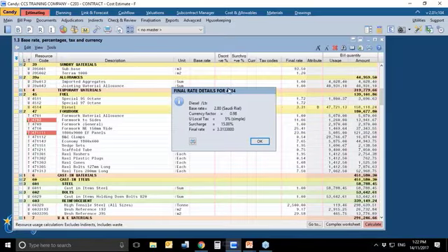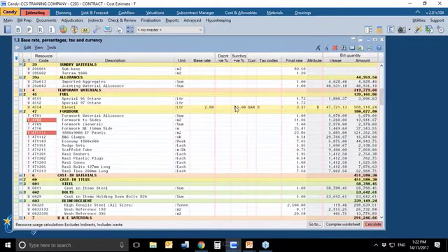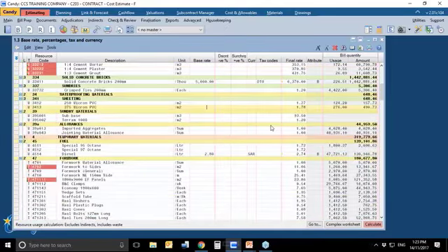I'm buying it in Saudi Riyals. The currency factor of 0.98 to work it back to AED. We've got a local tax here, 5%, and then you've got the surcharge. Now, the final rate, as we mentioned earlier, if you're buying it in the pricing currency, AED, you could very well type in your final rate. If you've got a base rate, you must update the base rate to calculate your final rate.